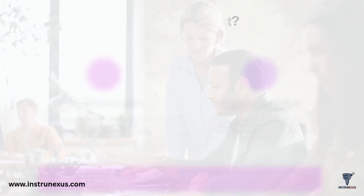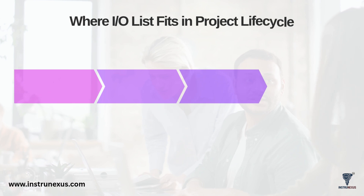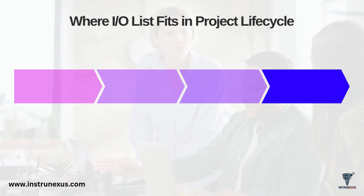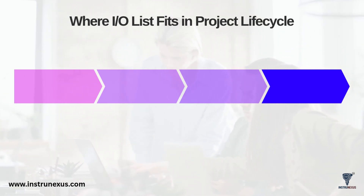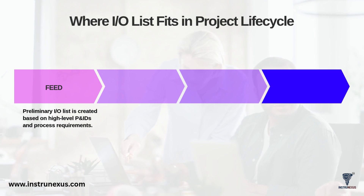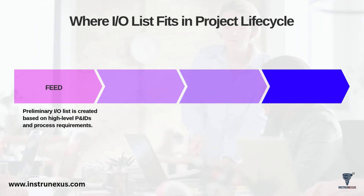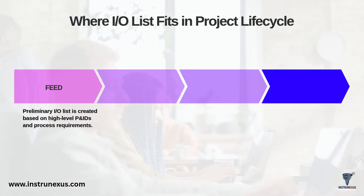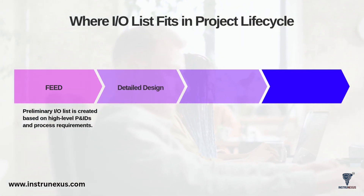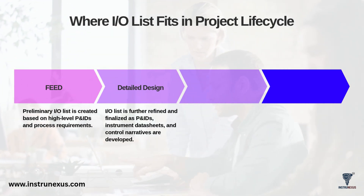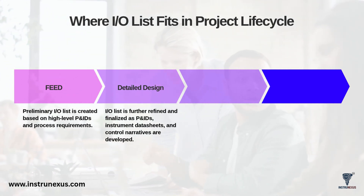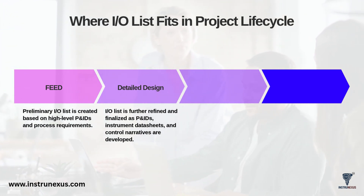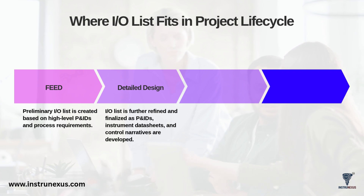The IO List isn't a document that's created once and then finished. It's a living document that evolves throughout the entire project lifecycle. It begins in the FEED stage, or front-end engineering and design, where a preliminary IO List is created based on high-level P&IDs and the initial process requirements. Next, during detailed design, the list is heavily refined and expanded. As P&IDs are finalized, instrument data sheets are approved, and control narratives are written, all of this new detailed information is used to finalize the IO List.